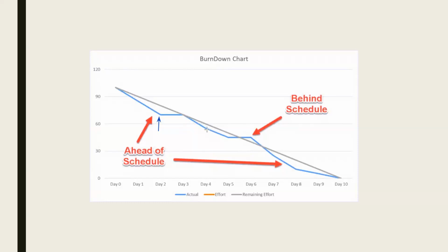Later, on day four, let us say they have worked again and one story is completed. Again they are below this line, so they are ahead of time. On day five, another story point is completed. They are ahead of time. That gives very good information saying that your team is doing good and is ahead of time. You're technically sound, experienced, and there are no impediments in your team blocking your work, and you are able to deliver as per the expectations of the team members. So you are very good till day five. Day five or six also is okay.